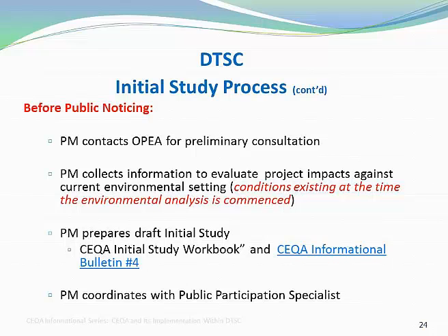So if the department doesn't file and it lingers around for a bit, and then decides, 30 days into the process, someone finds out that we didn't file, the trigger is the 180, because the statute or the guidelines specifically state 35 if it's filed, 180 if it's not. And so that would be my interpretation of it. And I think Marilee is correct that she will take a look at that.